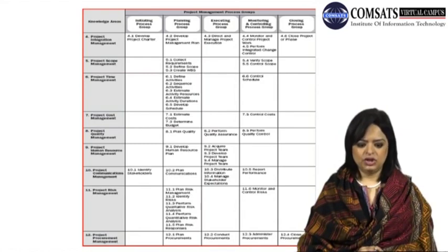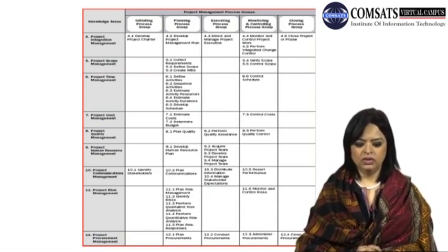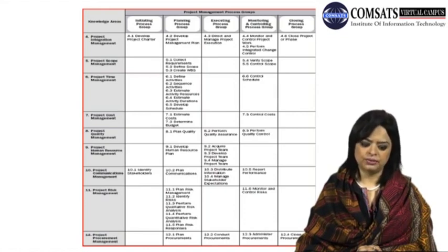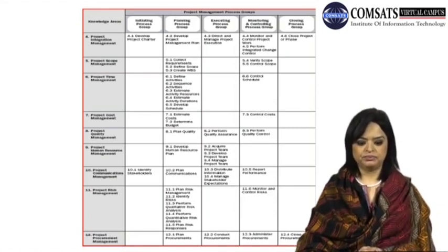So if I look at the initiation process, on the top most row, there are only two processes: developing of a project charter and identification of stakeholders. Developing of the project charter is within the knowledge area of integration management, and identification of stakeholder is within the knowledge area of communication management.